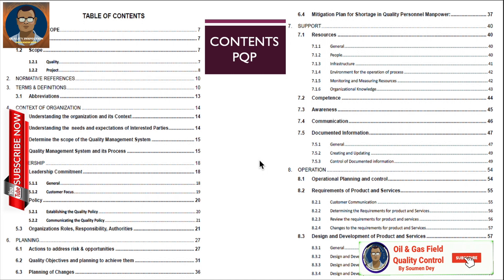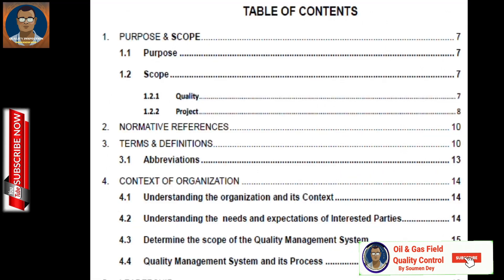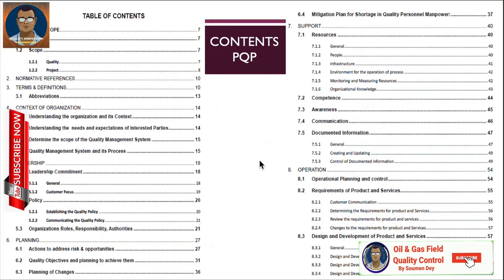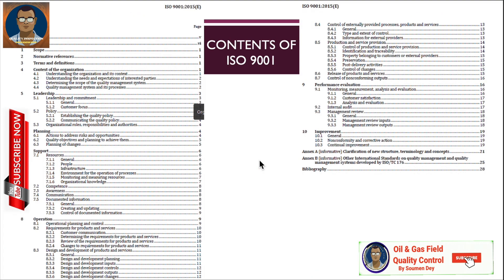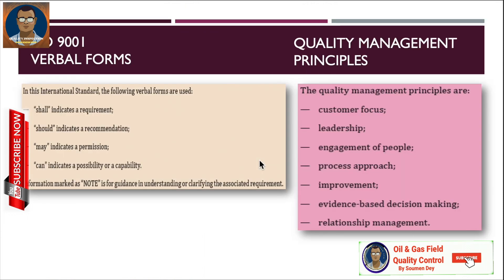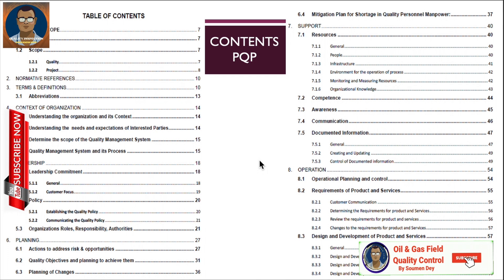You can see here a sample index from a project quality plan from one organization. Section 1 is purpose and scope, Section 2 is normative references, Section 3 is terms and definitions, and Section 4 covers the context of the organization. You can see it is similar to ISO 9001 contents.